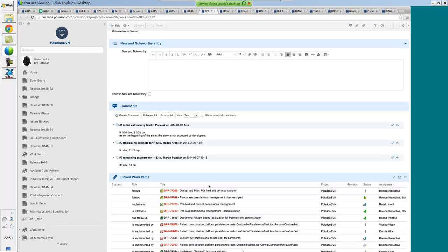One thing that we do during the stand-up meetings is when we check on the progress of user stories, we ask people how much they believe they have progressed and what is left to do. And then we always update right here on the top the time spent and remaining estimates to reflect this. Again, this gives us a better idea and better perception of how we're progressing and if we need to make any additional adjustments to it. So for this specific one, as you can see, there are a lot of tasks, user stories, and some defects done to complete it.